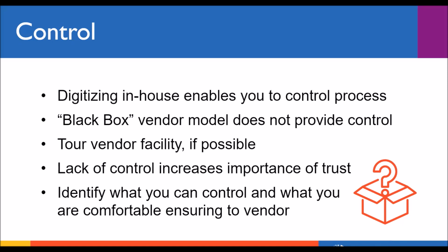Now, there's often a desire to let vendors handle everything. And sometimes they can do everything from picking up material to digitizing it, describing it, hosting it, and digitally preserving it. Depending on your situation, this might be the most appropriate path to take. But please, if you do, ensure that you always get a copy of your files and that the files are not in a proprietary format that you cannot access outside of the vendor system.